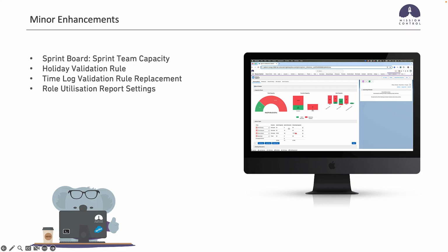The first one is disable fixed price billable hours enforcement, and the second one is disable fixed price non-billable hours enforcement. As it would suggest, these rules are going to be applied by default. If you don't want them to be applied, you would just need to go and set those settings to true. So ultimately, if the setting is false, you're not going to be able to log time that would cause the action's hours completed to be greater than the hours scheduled.